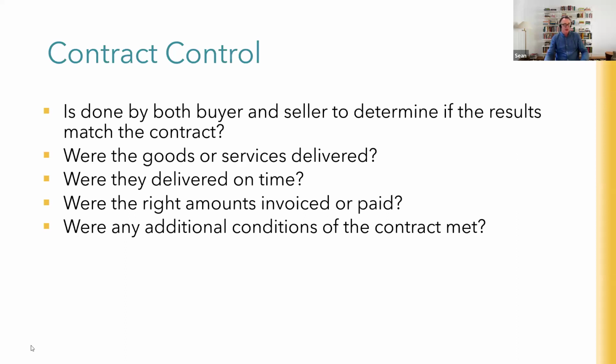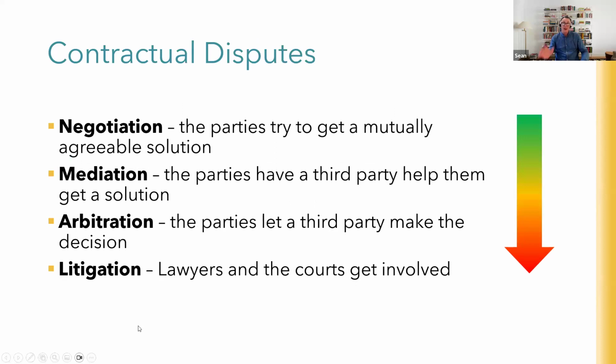Now, from time to time, there's a possibility that you are going to get into an argument. You're absolutely going to get into a contractual dispute, particularly with adversarial forms of contract. There's a general process that your contract will probably set out for resolving disputes. It starts here at the top and goes down to the bottom. The bottom is where the lawyers get involved.